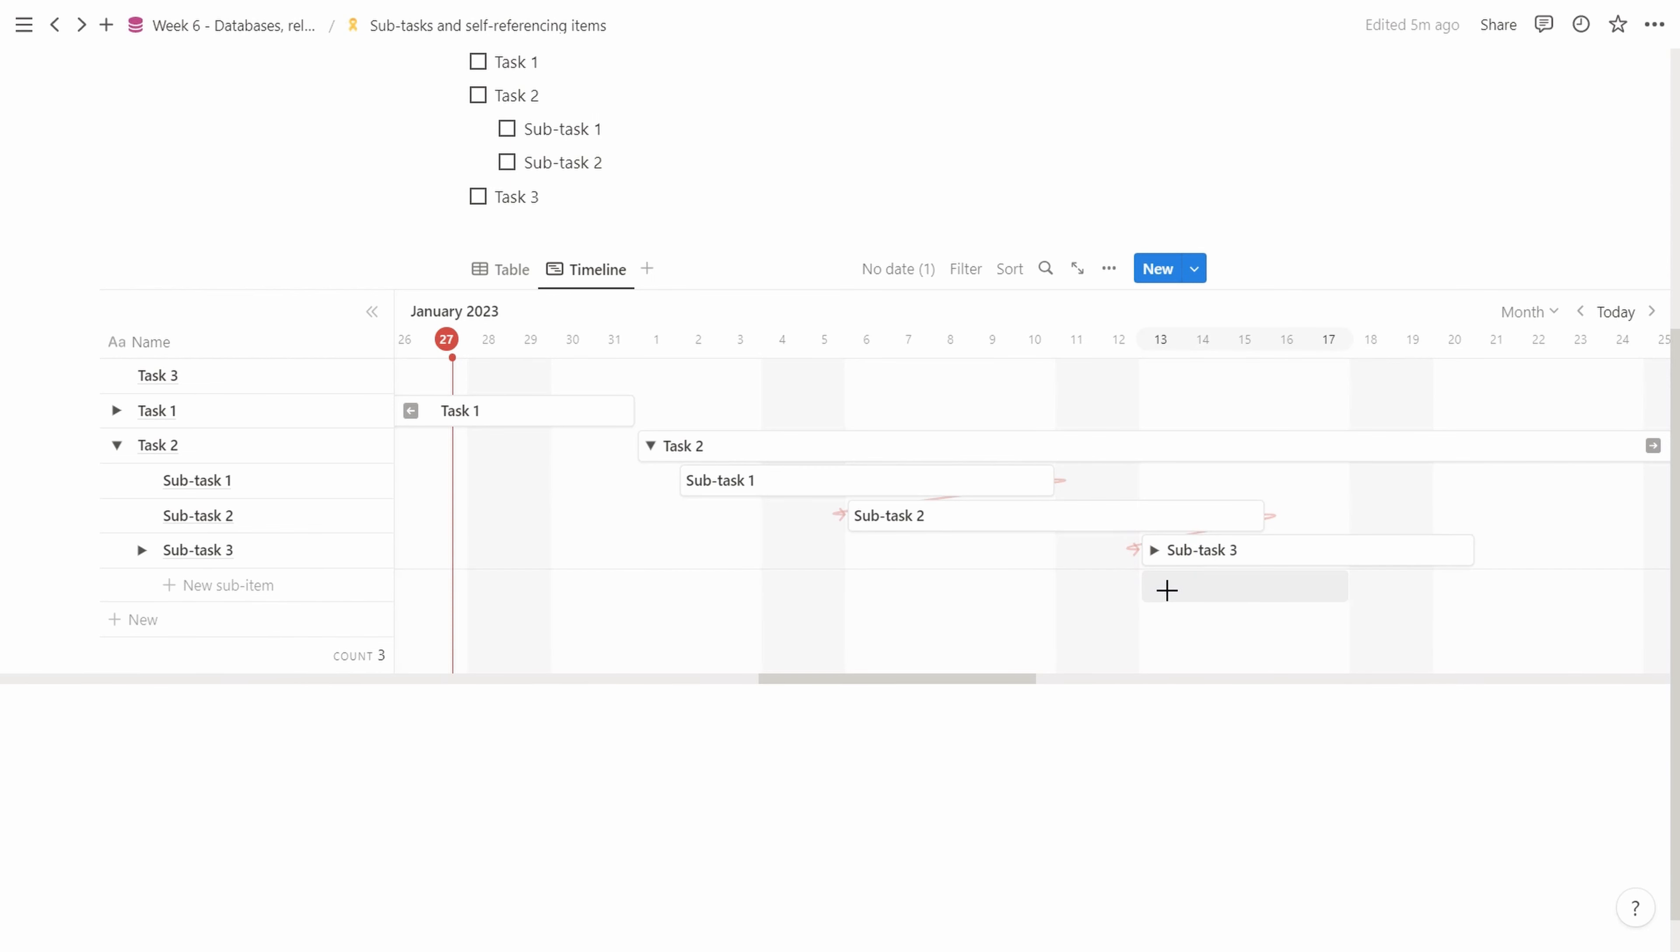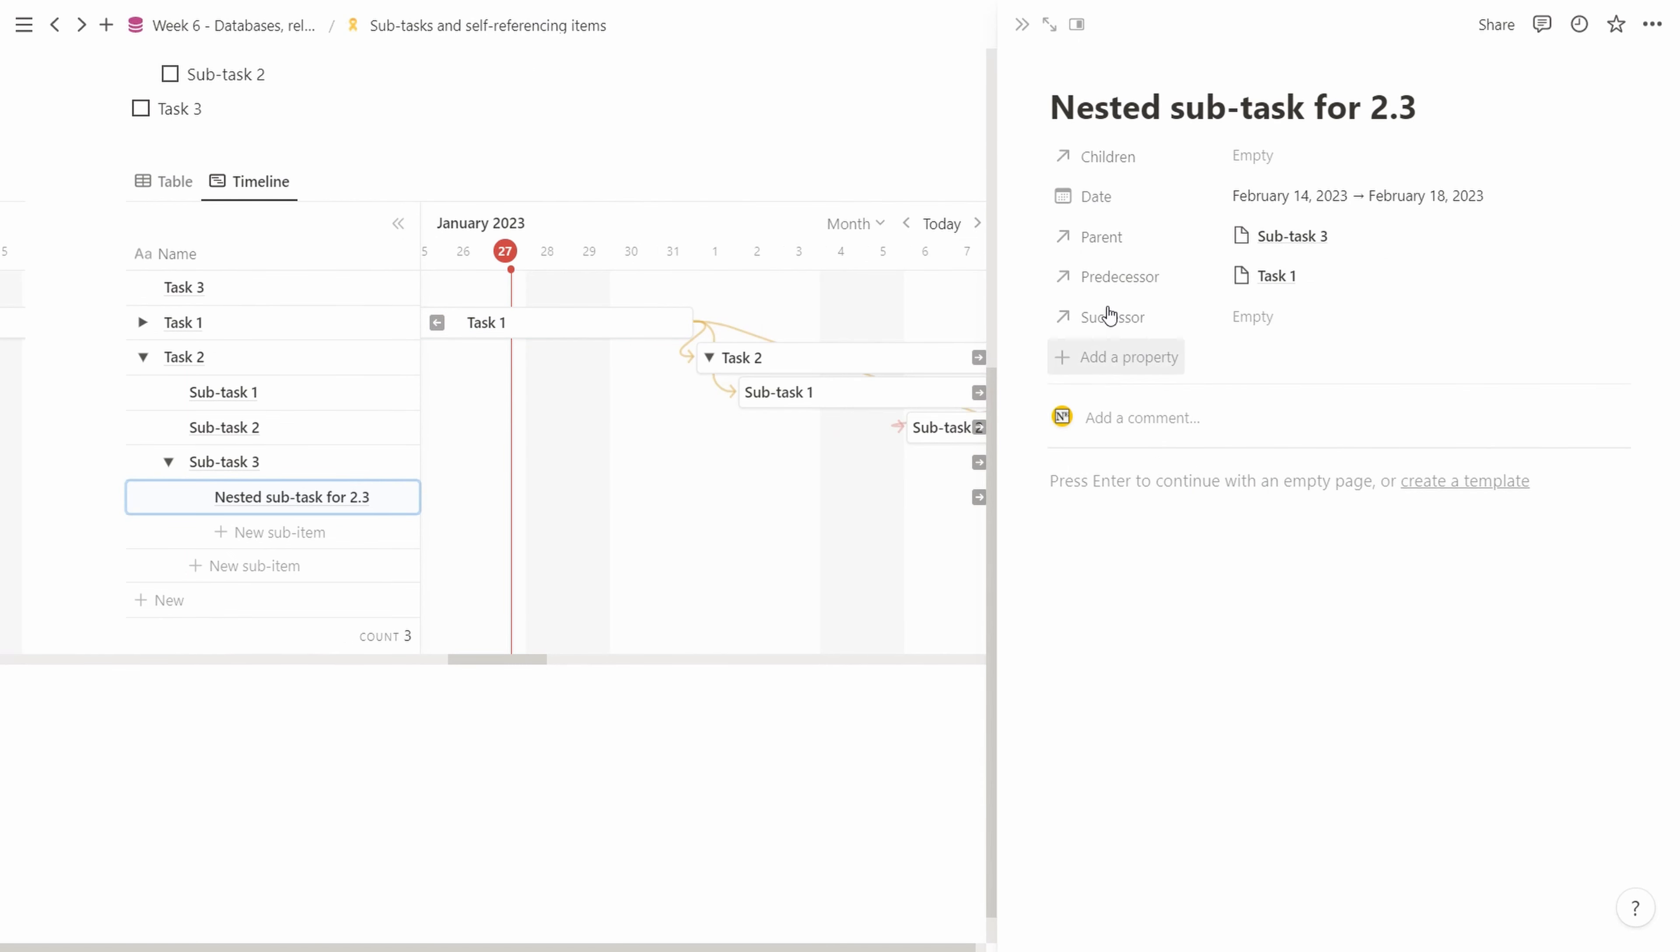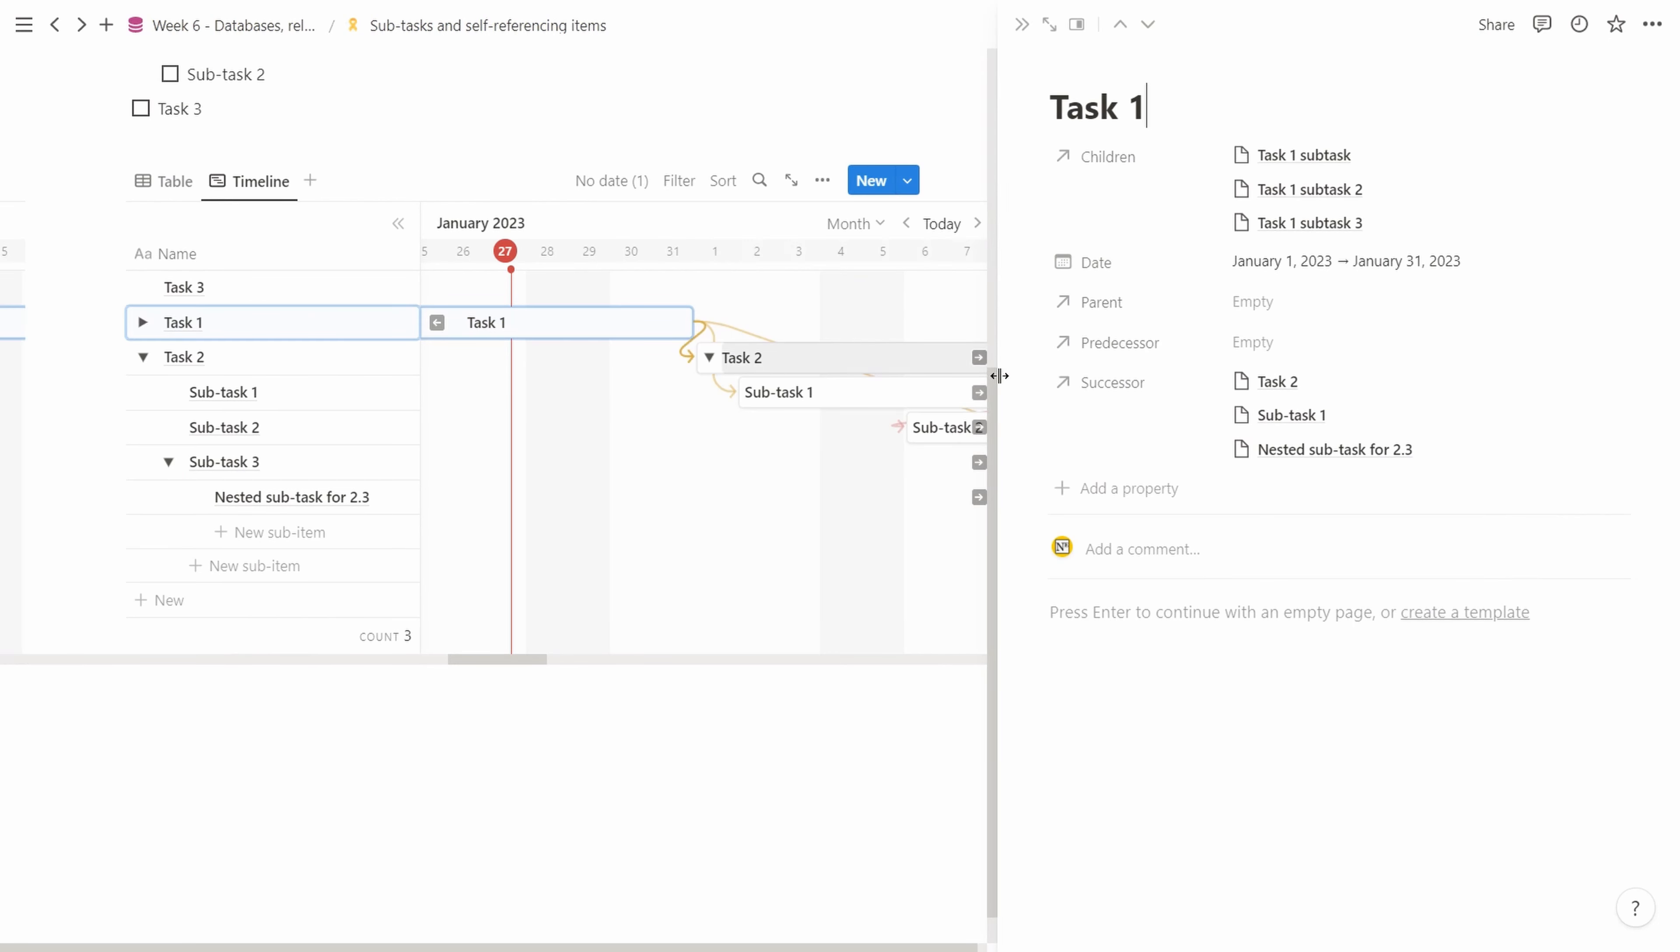We have nesting going on here. We collapse it and see only the parent task. We expand it and see both parent and child. This collapsing we can do all the way up. We can add a dependency between the first and second task. We can also add more dependencies. We can say it relates to subtask or even to a very deep nesting level. If we open this, we see it has both a parent and a predecessor, and they differ. We can do the same with task 1 that is linked to multiple. We see it has multiple children and also multiple successors.